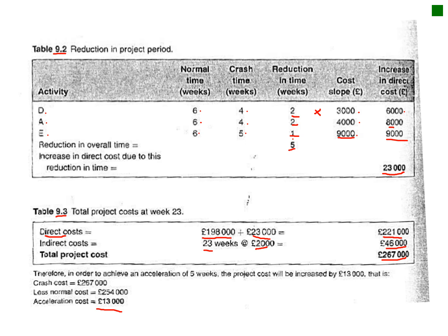Okay, now that's what I read earlier. So the relationship between the indirect and direct costs for each week of the project from weeks 28 to 18 can be observed in figure 9.45, which basically shows that the summation of the direct and indirect cost is displayed, and the point on the graph where the cost suddenly increases is the position of the optimum time and least cost situation. This occurs at the end of week 24.